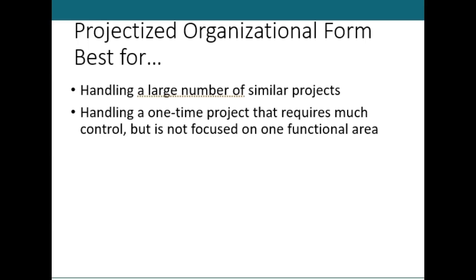Projectized is good for handling a large number of similar projects. So you might even have a number of program managers because they're similar projects, because you want to gain efficiencies between them and share resources and knowledge. As one learns, the other goes, I could use that. Great. Also, if you're handling one project at a time that requires a lot of control, some big strategic project, that would be another reason for a projectized organization.